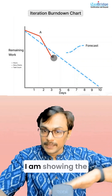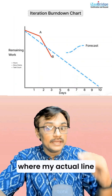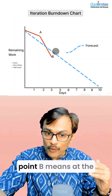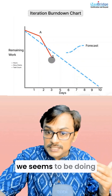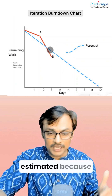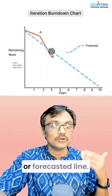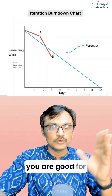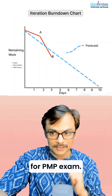At point B, I'm showing the reverse situation, where the actual line is below the forecasted or expected line. At point B, at the end of day three, the team is doing faster than initially estimated because the red line is below the expected line. Keep these two things in mind and you are good for your iteration burndown chart questions on the PMP exam.